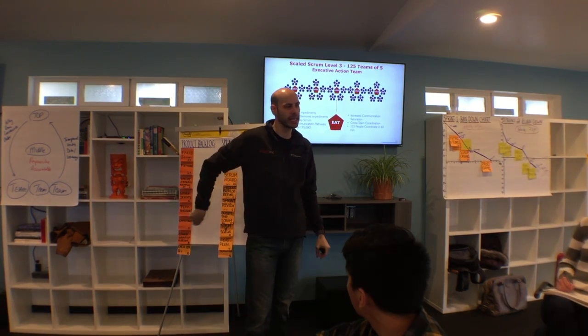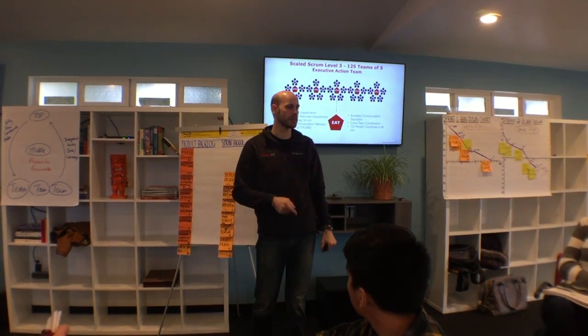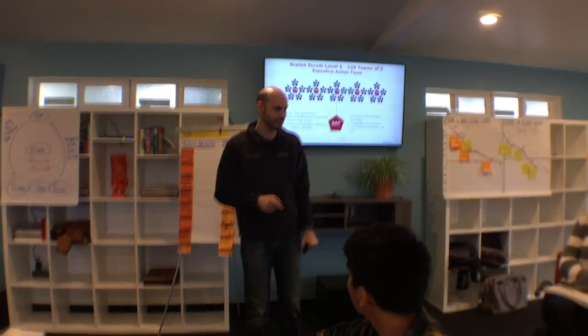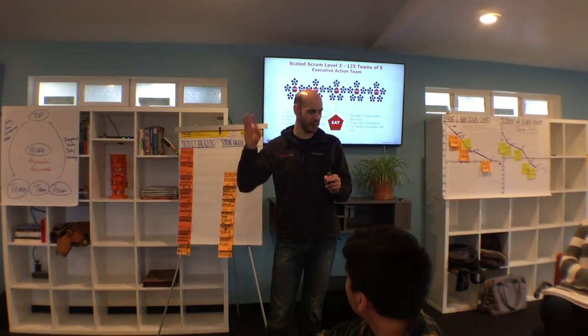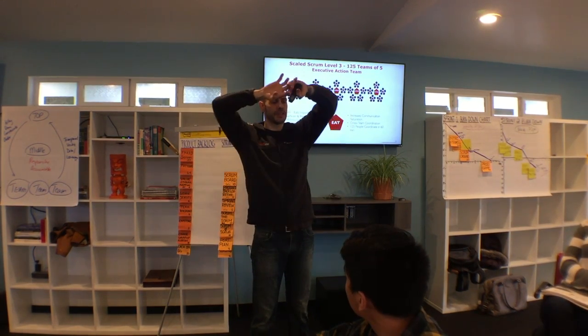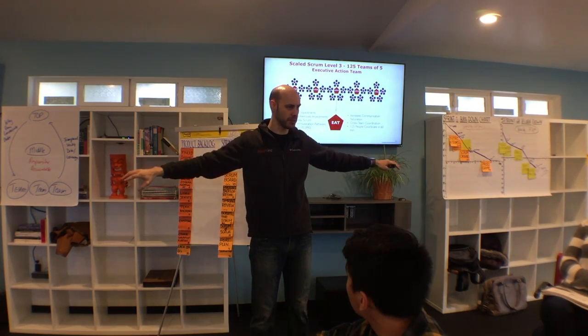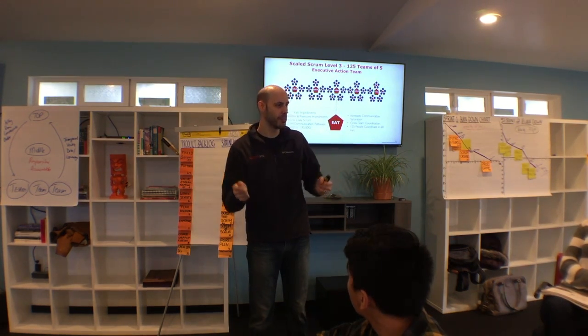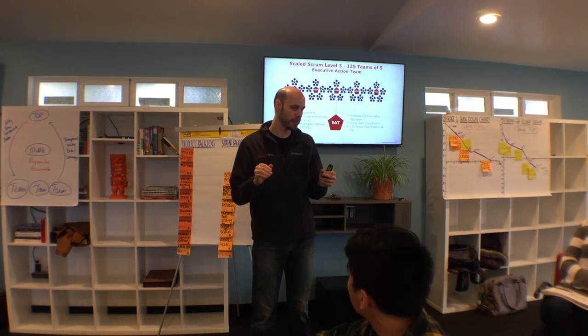We'll discuss that later after lunch during a pattern that's called the interrupt pattern that Chris Wallace coached the state of Washington in on Wednesday. Until we discuss the interrupt pattern, this might not be too clear, so we'll discuss that part in more detail later. But for now, suffice it to say, the Scrum Masters are going to take newly written backlog of impediments to their product owners and say, will this fit in any of our backlogs? Because we are going to fix this now. Every day, new backlog gets added to the product backlog of impediments to remove.